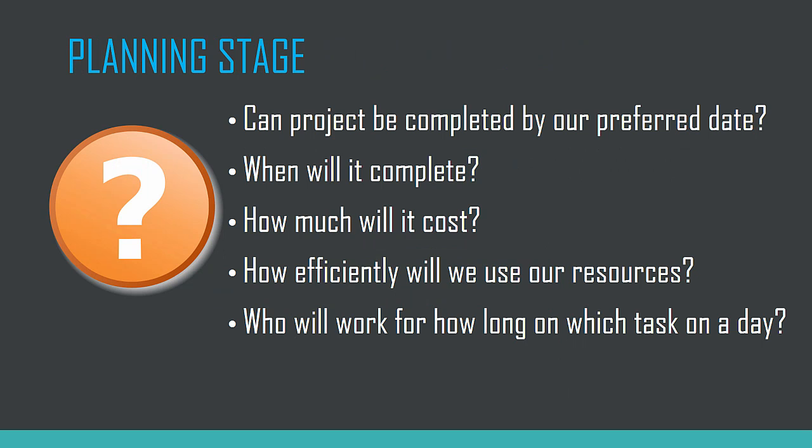During the planning stage, the objective of the project manager is to have answers to these questions. Can the project be completed by a date that we prefer? When exactly will it complete? How much will it cost totally for the project to be done? Will we be using our resources efficiently? And finally, who will work for how long on which task on any given day? Answering the last question will help us answer all the other questions.